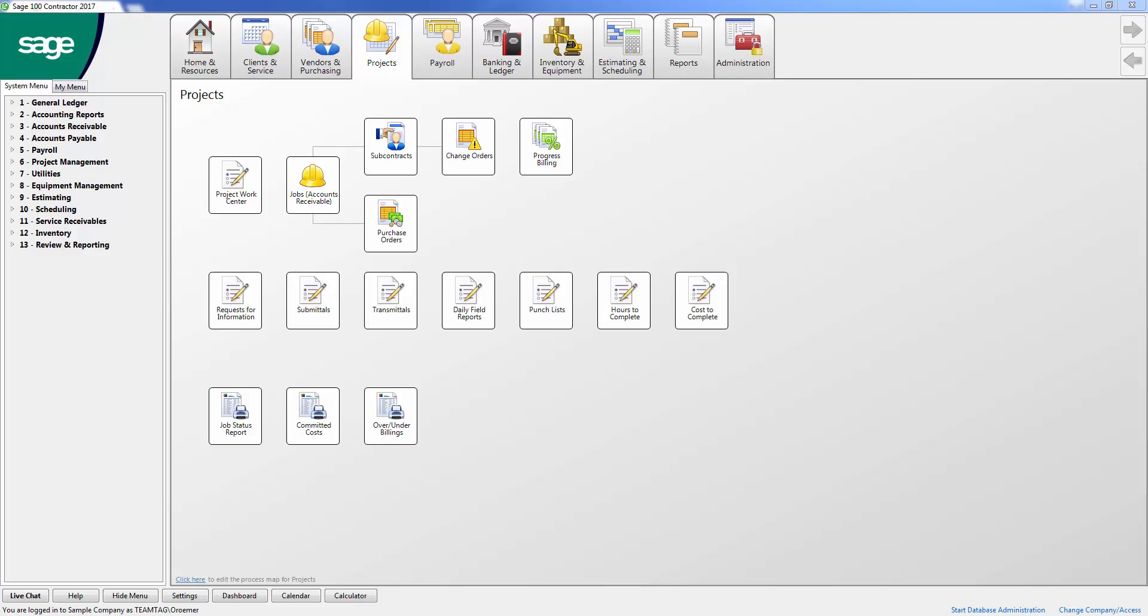Sage 100 Contractor can provide you with these accurate costs to complete by using the cost-to-complete worksheet inside the software. The cost-to-complete worksheet relies on the accuracy of your job costs, so make sure that everything is up-to-date within Sage 100 Contractor. Confirm that all job costs are posted and you have entered any recent change orders before updating the worksheet.